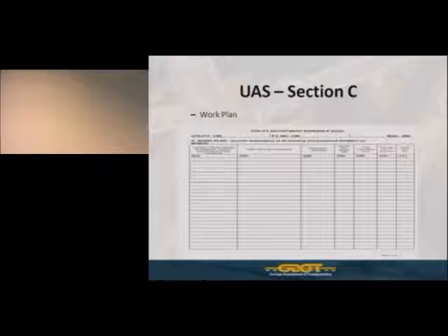What we've seen in the past at times is where a utility owner has taken a set of plans and redone cut sheets and created a whole completely separate type of layout that is not really correlated to the roadway plans. This is something that would be unacceptable. These locations need to be easily identified on the DOT roadway plans.